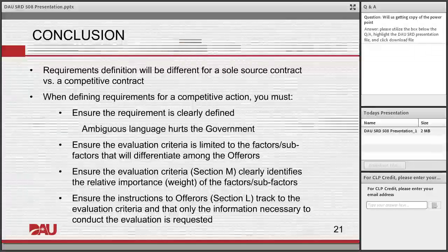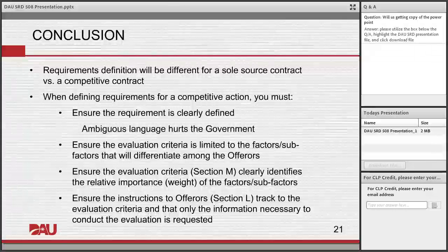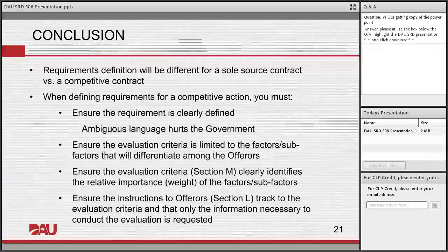So you not only identify what technically acceptable is, but you have to tell offerors in your RFP what acceptable looks like. What is the standard of proof that that contractor has to provide in his proposal to earn the acceptable check mark? So that's the closest thing under best value that we have to IFBs.